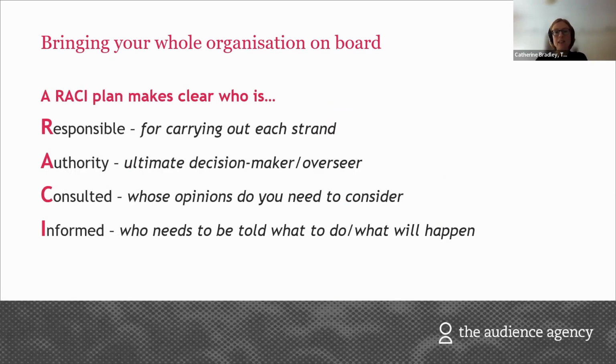And just lastly, a useful tool to consider here is RACI. And this is a framework that can be used for different elements of your plan to make it very clear who has, first of all, the responsibility for carrying out different areas, who has the overall authority for making things happen or making sure things happen, who needs to be consulted and their opinions considered, and who needs to simply be informed of what will happen.